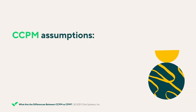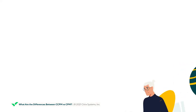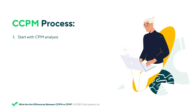CCPM is based on several assumptions. The first is that task owners will often overestimate how long an activity will take, leading to wasted time. Secondly, that task owners will procrastinate and delay start time, or finish early and increase the scope. CCPM starts with a CPM analysis of the project scope, then tasks are scheduled based on their durations and dependencies. Next, crash the schedule by removing 50% of the estimated duration of each activity, and put this time into a buffer at the end of the activity sequence.